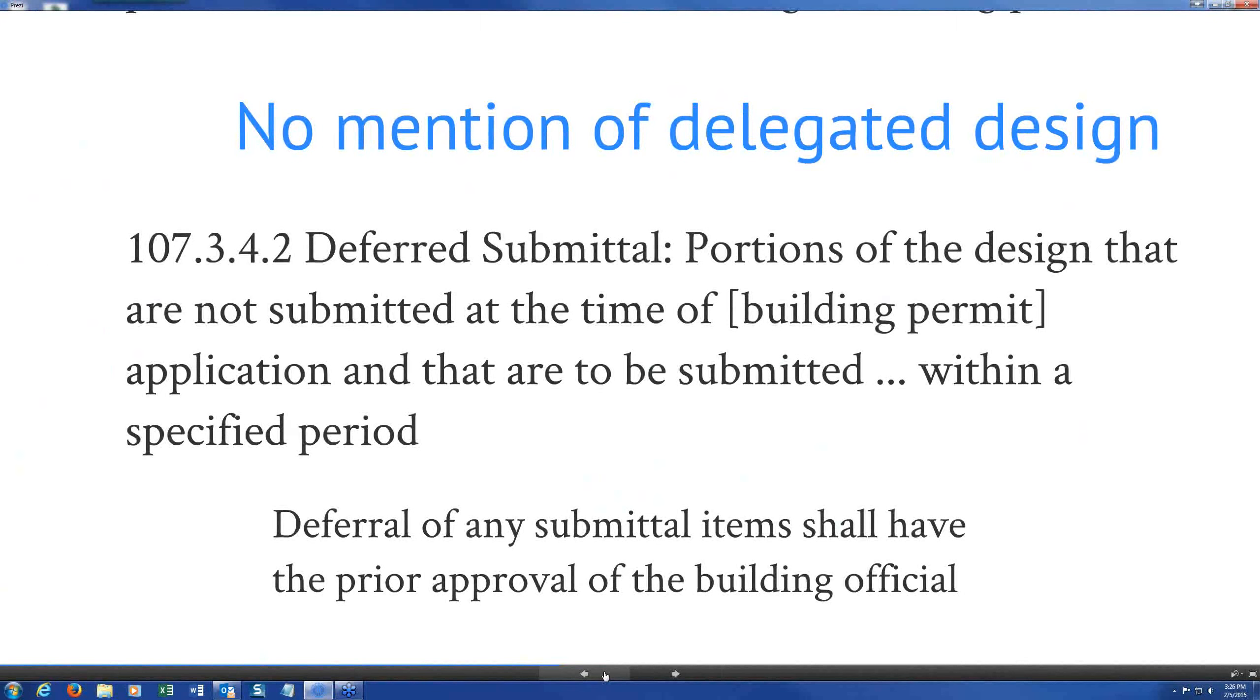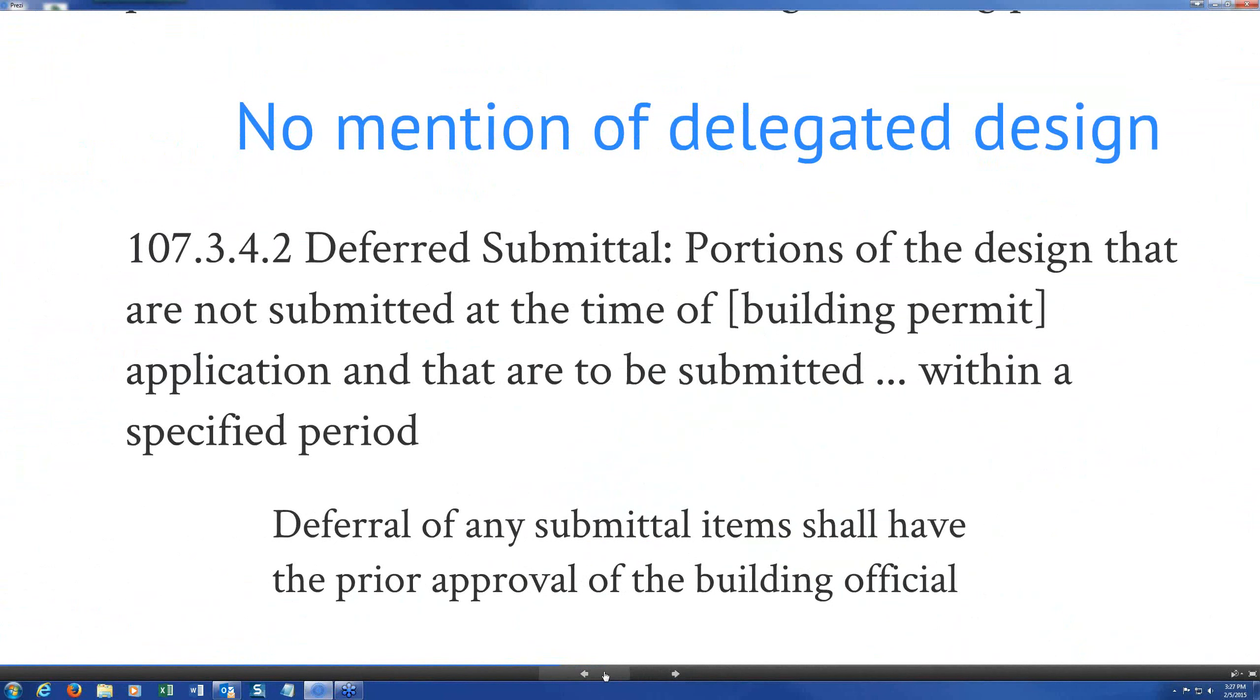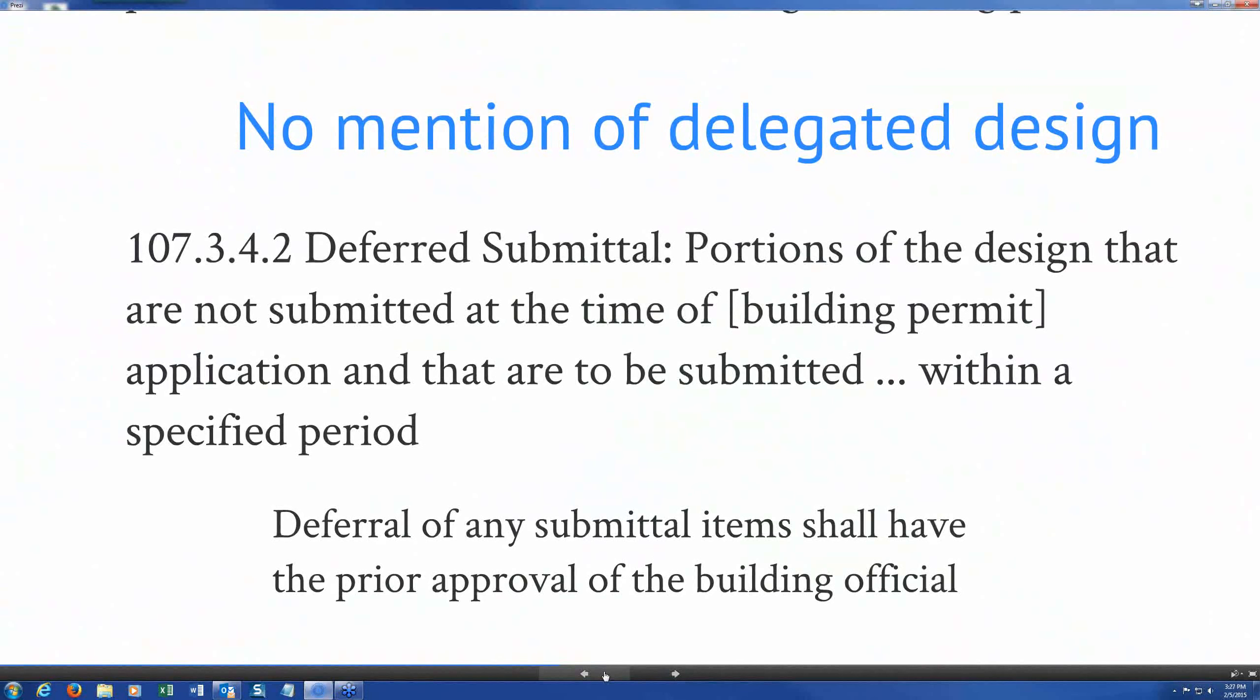And shop drawings shall contain all information as required by the reference installation standards in Chapter 9. So that's one place where the code is recognizing up front that the AE, the design professional in responsible charge of the project, is not going to produce construction documents for the fire protection system. And they are an example of what they call in IBC 107.3.4.2 a deferred submittal, a portion of the design not submitted at the time of the building permit but would be submitted at a later date. And in most cases those are shop drawings that are actually prepared by the contractor.